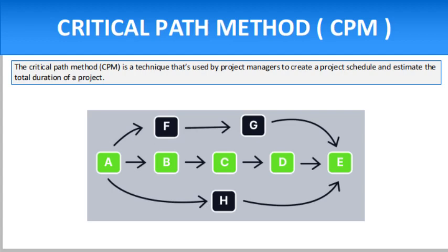The CPM method, also known as critical path analysis, consists in using a network diagram to visually represent the sequence of tasks necessary to complete a project. Once these task sequences or paths are defined, their duration is calculated to identify the critical path, which determines the total duration of the project. Projects are made up of tasks that have to adhere to a schedule in order to meet a timeline. It sounds simple, but without mapping the work, your project scope can quickly get out of hand and you will find your project off track.